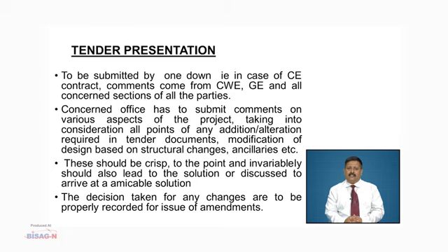whether they be addition or alteration that is required in the tender documents, or modification of a critical design based on structural changes, or changes in ancillaries or the specifications. These should be crisp, to the point and invariably should also lead to a solution, or should be able to be discussed to arrive at an amicable solution so that the project can proceed. The decision taken here for any changes is to be properly recorded for issue of amendments.